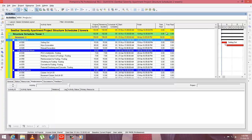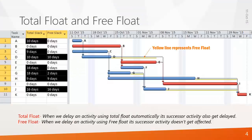Also check the total float and free float. Now let's see the difference between total float and free float. Here is an example for better understanding — a schedule containing 11 activities where some have total float and free float. Look at activity A, which has 10 days float and 0 days free float. When you delay activity A, automatically activity D also gets delayed. Similarly, when you delay activity C it will delay activity G. This is total float — when you use total float, its successor activity also gets delayed but project duration remains the same.